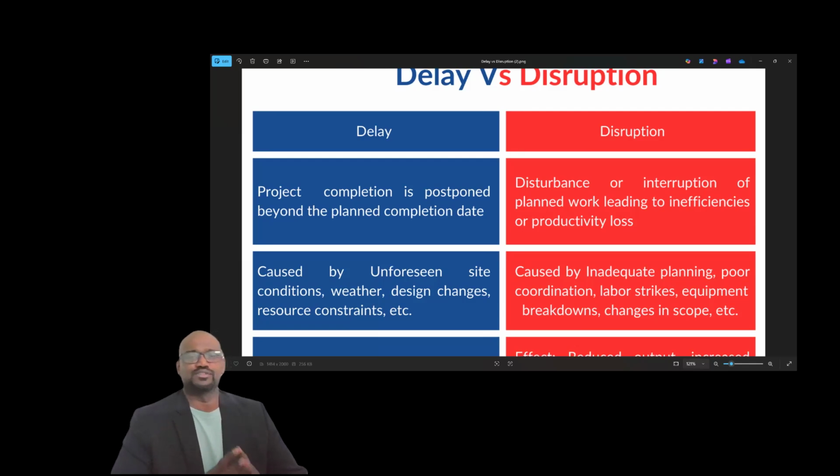But if you look, there is no idle manpower. The people are working for all the 4 days. So does it mean that they have not planned it properly? Might be. Is it that the 2 people who are working are not working efficiently? Might be. The productivity might be less. Or the 2 people are working with good output, but the requirements like machineries, which have to be coordinated or supplied by the supervisors, are not being done, and that's poor coordination. So these things you cannot measure easily. But still there are methodologies to measure. We'll see later how it will be measured.